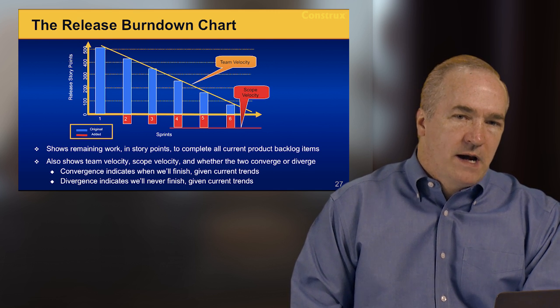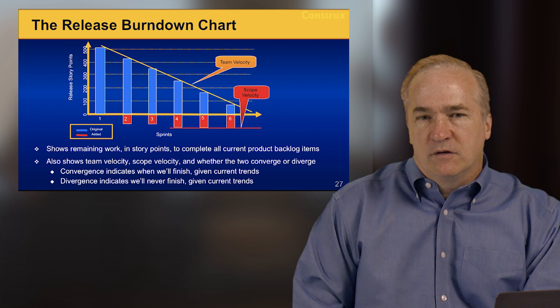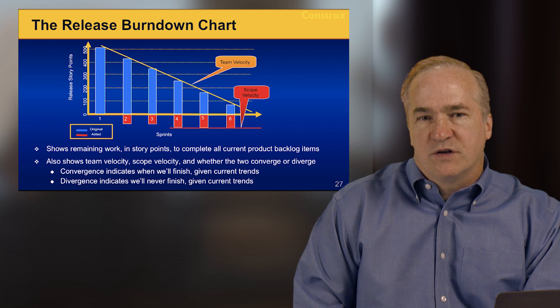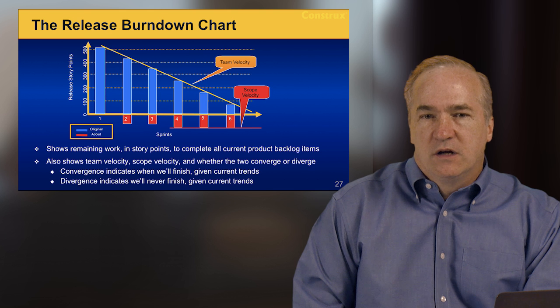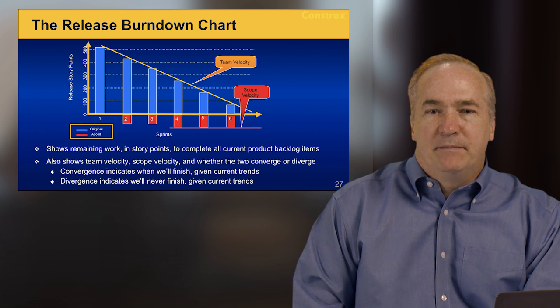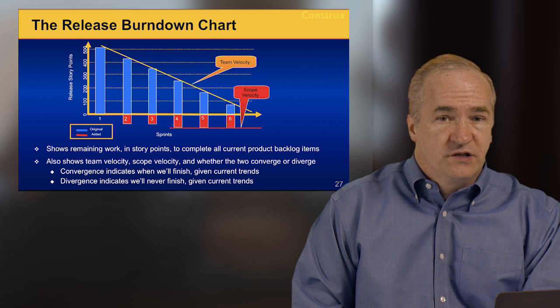So if my product manager came to me as a product owner and said, hey, we've got to release after the date, which would be at the end of sprint 5, because our competitor has just announced a new version and has some of our features. So what would you have to do to get out after 5 sprints? Well, again, looking at this chart, I have to run out of scope at the beginning of sprint 6 to be done in 5 sprints, which means I have to cut about 80 points of scope.